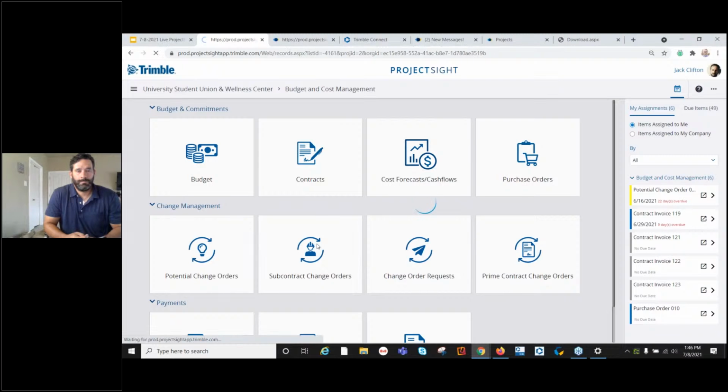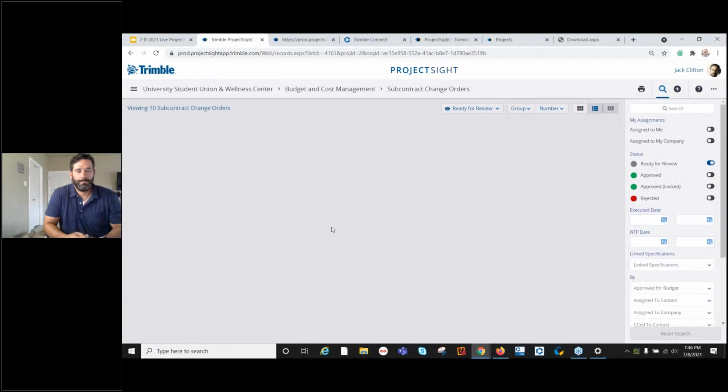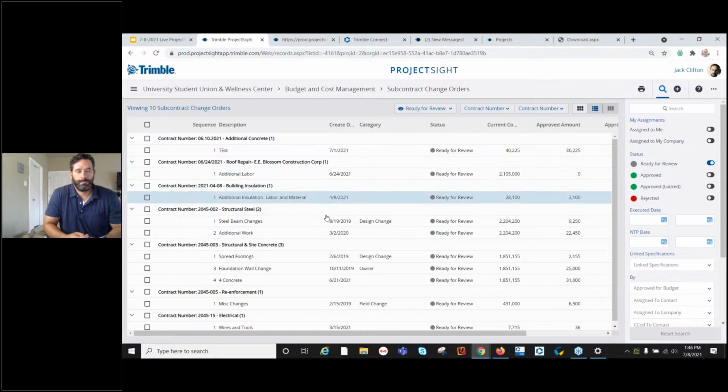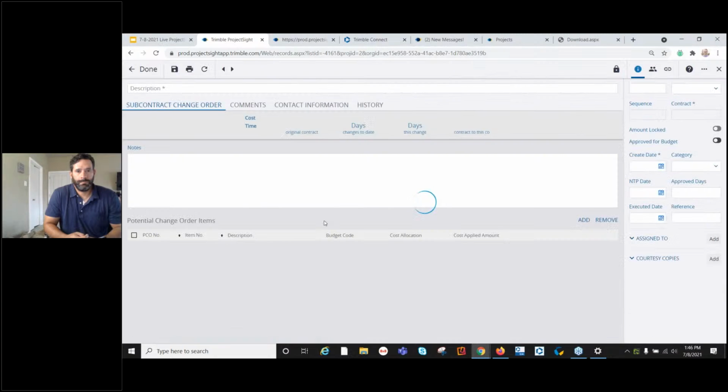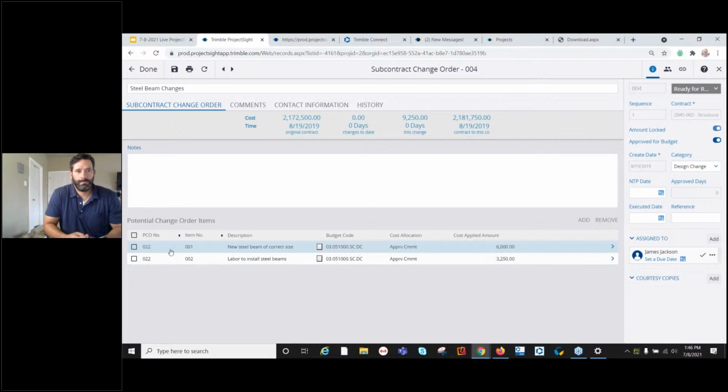And in this case, I can pull different items from different change orders together to group in the subcontract. So in this case, it's from the same PCO, but I can pull multiple different items in here. If they are associated with a specific contract, then I can do that and go ahead and get that signed off. And that's when those dollars will shift from column to column within that budget screen.